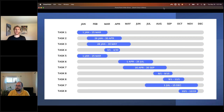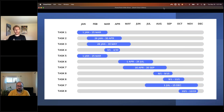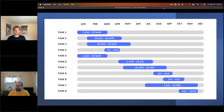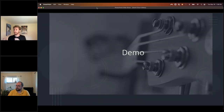For example, if you're building a house, task one might be digging the foundation. You need the foundation squared away before you can work on framing, so if the foundation gets delayed, you want framing to be pushed out too — and everything dependent on that. By default in TrackVia, Gantt charts don't have that dependency ability, but the implementation engineers have come up with a great solution, so let's jump into the demo.